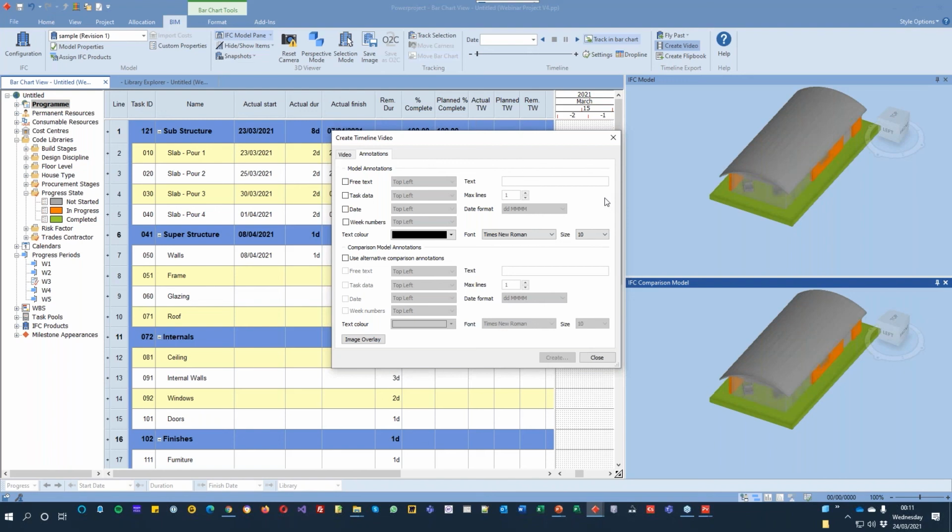So we have another question in here. Someone's asked what supported BIM model file formats. What we deal with purely at this point is IFC. So we work with IFC 2x3 and 4. We are looking at the new 4.5 or 4.6 one there, and it allows you to import those IFCs. You can either bring them in individually, or you can bring multiple files in and federate them together inside Powerproject. Even if those models don't line up, there are options inside Powerproject to align those models.